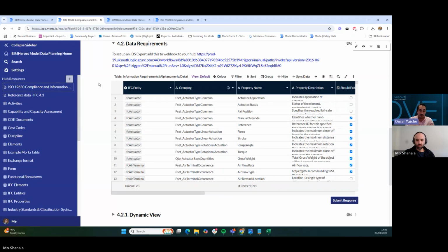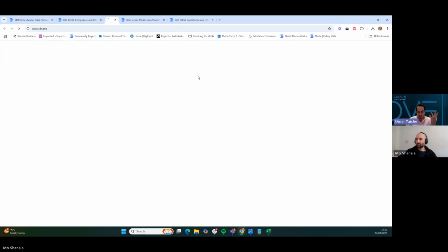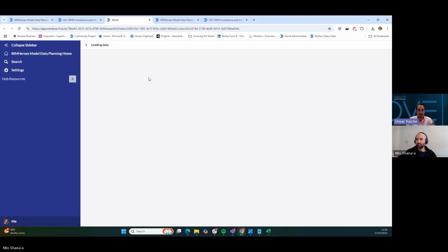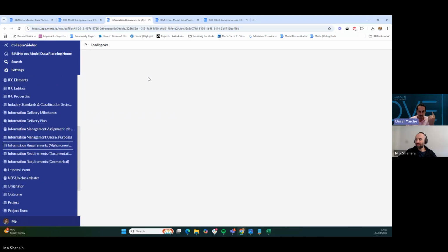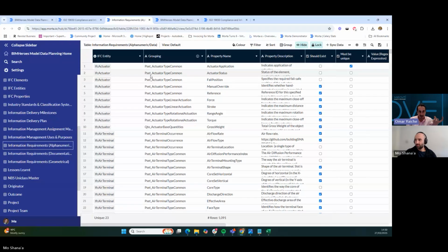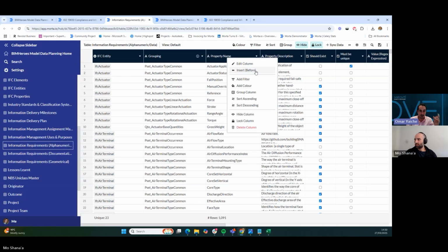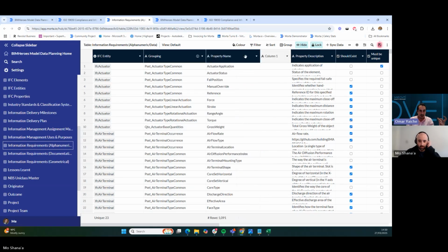And one thing with automation I see just now is that I try to figure out when we can also add revision of this element data requirement from the different appointed parties. Because sometimes, one of the cons of my process is that it had to be managed by the BIM manager of the owner each time to implement a new parameter. They have to go through the BIM manager because only one person can manage it. But with this system, we can work in collaboration via a revision system where each discipline can add what they need. I can implement and add.